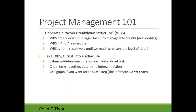The very basic thing in Project Management 101 we'll be using is something called a Work Breakdown Structure, or WBS. All this does is break down a larger task — like 'build a robot,' which could mean anything — into very manageable chunks called deliverables. It's not a schedule. It's not telling you how you're going to do something specifically; we're just saying what we need to do. For example, 'make the system that controls the motors' or 'make the system that senses if there's a wall in front of you' — those are deliverables.